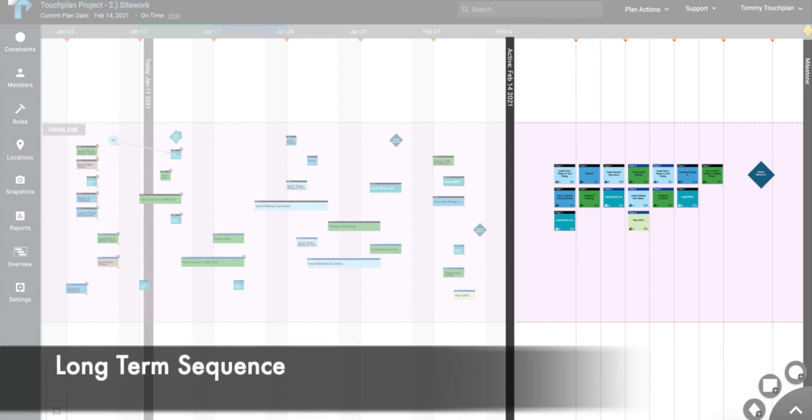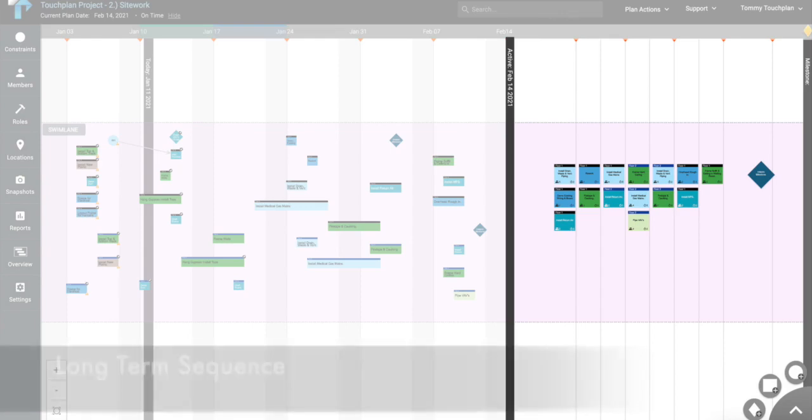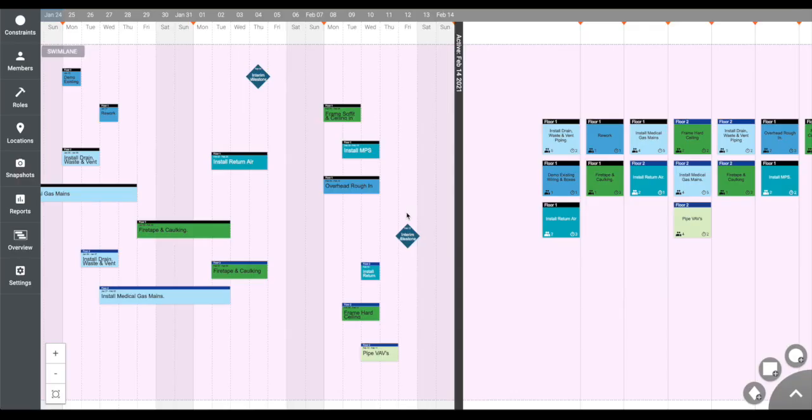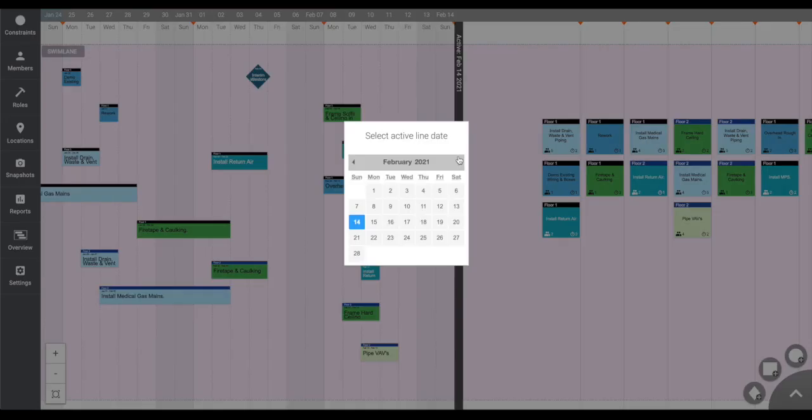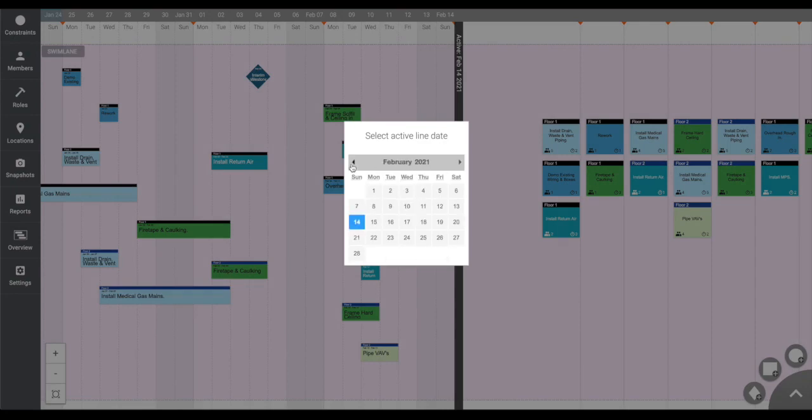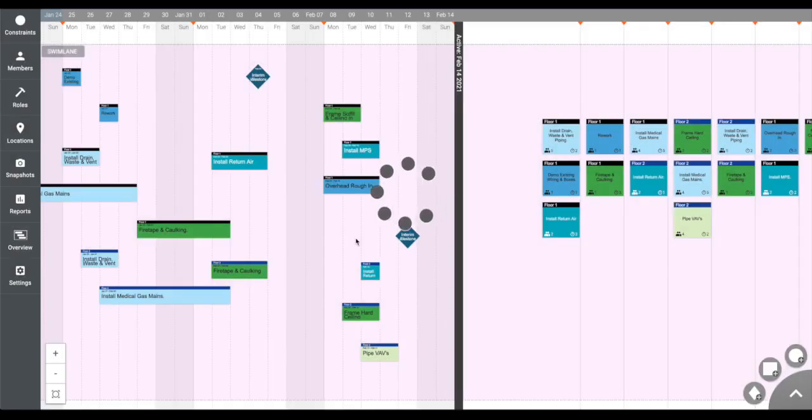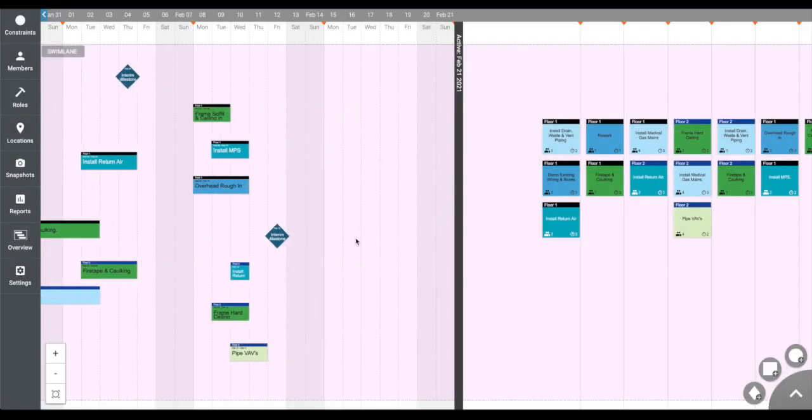To extend your schedule timeline, simply click on the active line and a calendar will appear. Select a date into the future and your schedule will extend to that date. We recommend having your active line positioned at least six weeks out in front of you so you can effectively build look-ahead plans in the short-term on a timeline.